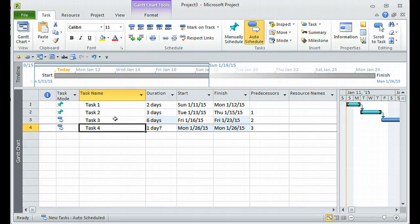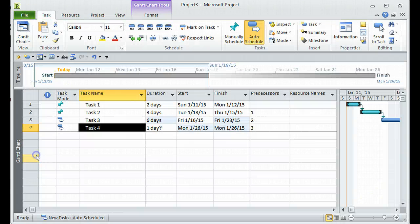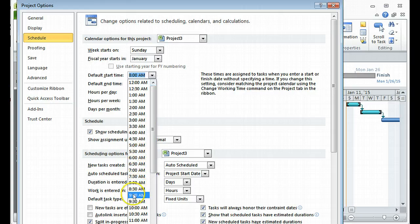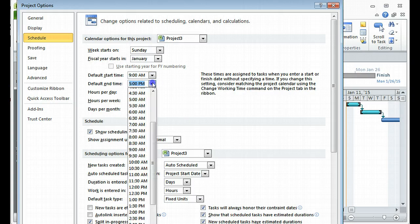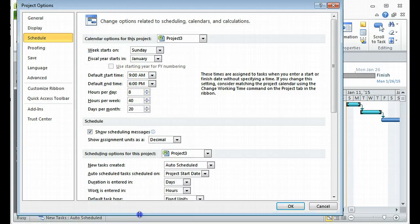The second thing I wanted to show is how to change the working hours of a project. Go to File, click on Options, and under Schedule you will see the default start and end time is 8 a.m. to 5 p.m. Let's say I want to change this to 9 a.m. to 6 p.m. — just update those fields and click OK.